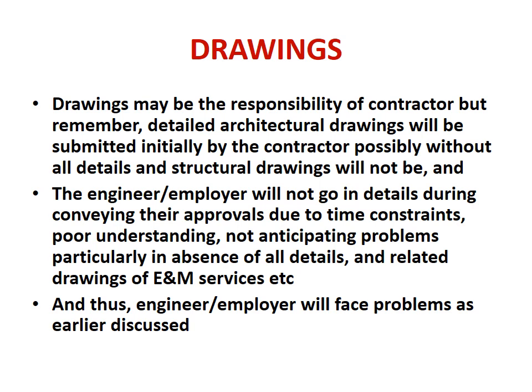And the engineer or employer will not go into details while conveying their approvals due to time constraints, poor understanding, or not anticipating problems, particularly in the absence of all details. Related drawings of E&M services, etc., may not be available, or even if available, they will not be referred to. So the engineer or employer will face problems as earlier discussed. That is the problem in an EPC contract.